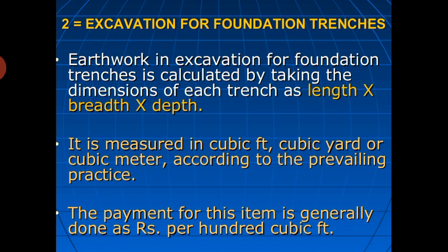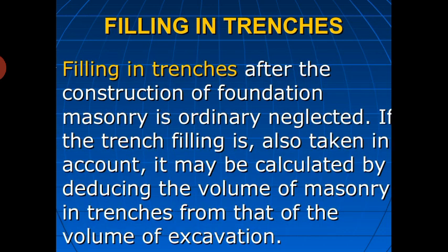If you take a JCB, they will come and for 1 hour they will take 700 rupees. That way also you can do it. But normally when we are calculating with the help of the PWD SR rate, it is per cubic meter of soil excavation, what will be the price. But most of the time we will consider it per hour. If you run the JCB for excavation, this will be the rupees. And filling of the trenches.